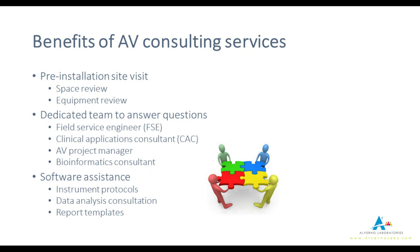In addition to those checklists, we also had a pre-installation site visit by our field service engineer. We set up the laboratory the way we thought it would best work, knowing the instruments we'd decided to purchase, and he was able to confirm or redirect us on whether our setup worked — since he has to be able to move around the instruments for service. This meant we could address these issues long before we even took delivery of the instrumentation.